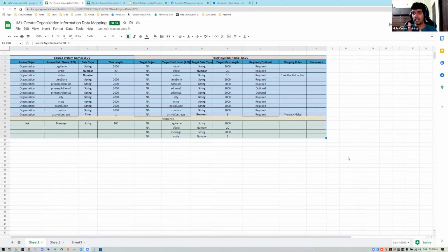And there is one more aspect for this particular design first approach, which means that multiple teams can parallelly develop. Why? Okay, so I have my system API. I define what is the request I need, what is the response I'm going to get, even if it is an error. So these are the fields that you will get. So if I design my system API first, who is going to benefit? My experience API is going to benefit.